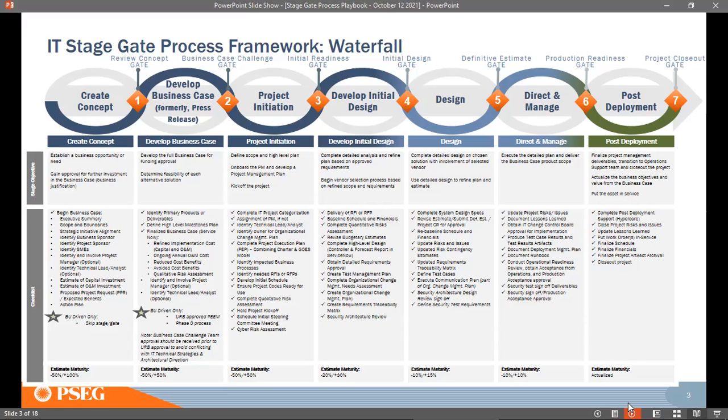If it is successful and approved, then you go into the third one, that is project initiation. If by any chance the approval was not given or the project is denied, it will be either parked or cancelled, so that you can bring it up next. If there are any technical clarifications that are needed, then you provide them and then you get the needed response from the senior leadership team. EPMO team facilitates all these activities to your benefit.